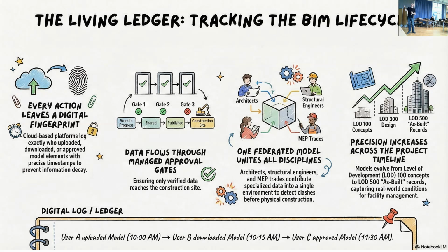Okay, so every action leaves a digital fingerprint. Like you open the file, you upload the file, you change the file, you make new alterations. It leaves a digital fingerprint. We have gates: work in progress, shared, published, construction. So we have different gates, and data flows through managed approval gates. These approvals are made by people. Okay, so when they make approvals, that is recorded too.